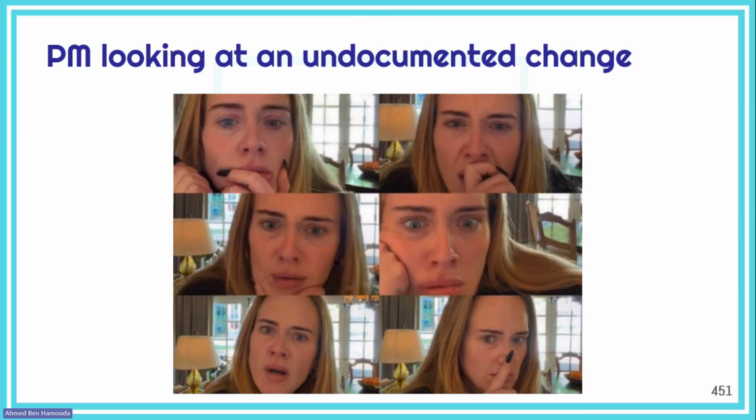reflected in the project plan without it being approved, then you will take it easy with the rest of the requests, and you will just do it, and then at the end you end up having scope creep, because your scope was expanded without any control, any change requests. Your project was supposed to last for 1 year. Now it's almost 2 years and it didn't finish. You keep asking for more and more money for your project. And that's really a nightmare.